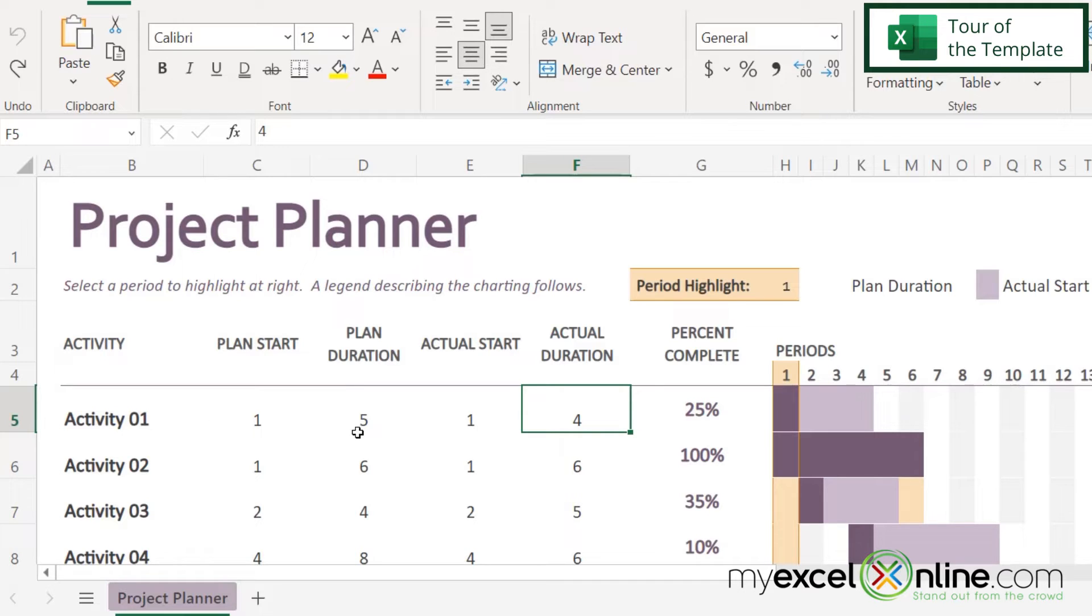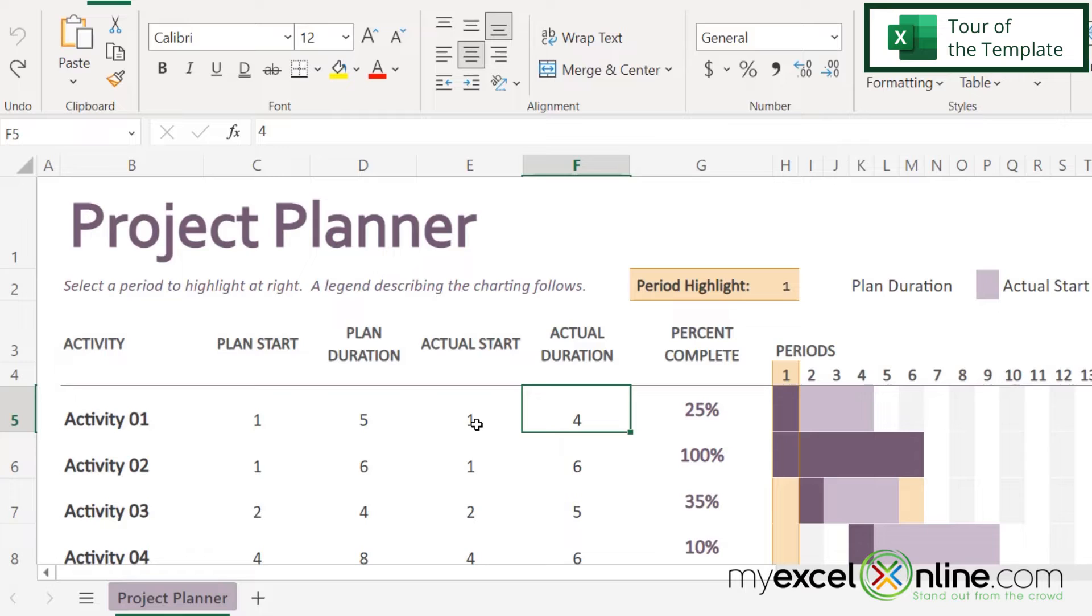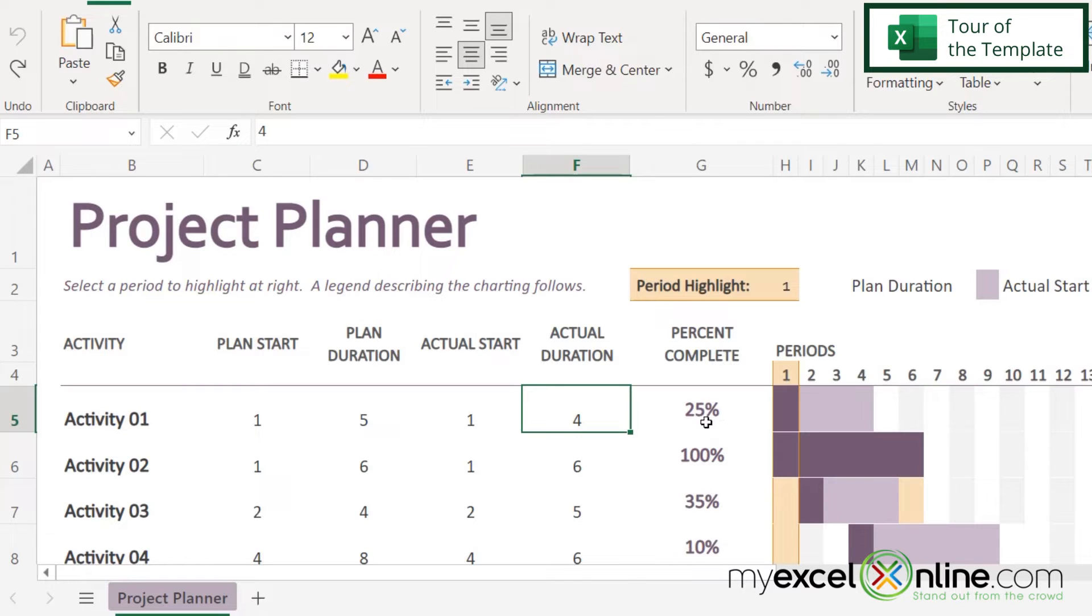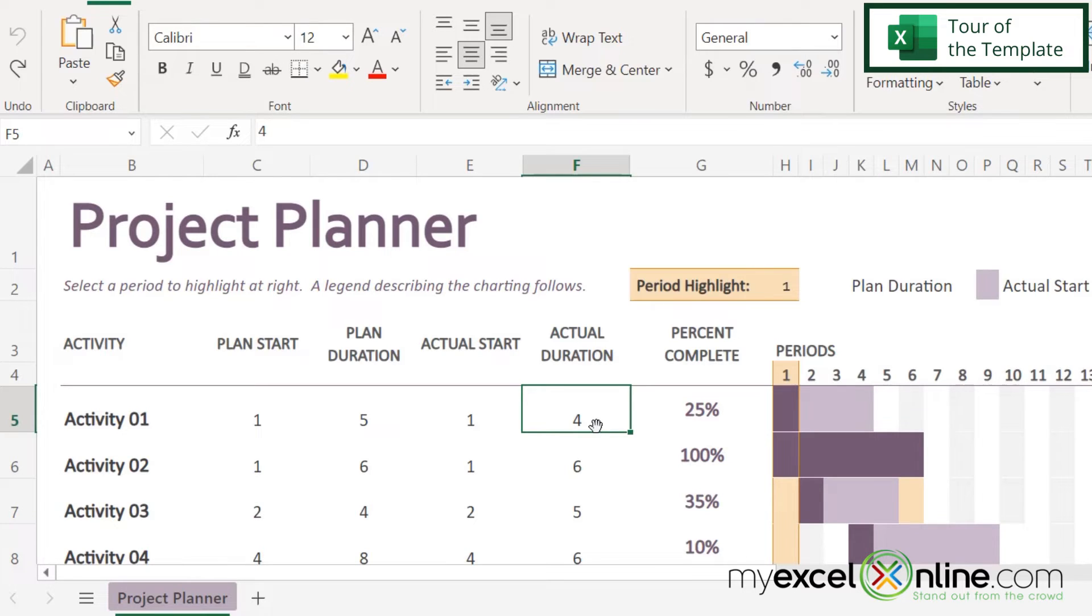So let's play around with a few of these numbers and see what happens. So on this first activity, I have a plan start and an actual start that coincide with each other. So I actually am starting this task on the day that I plan to start it on. I had planned for five days of the duration of it, but it actually only took four days. And right now I'm only at a 25% completion rate. So let's think about what that means. It means I have done one of these four actual days of work. And because of that, this will be shaded dark purple because this means percent actually complete.